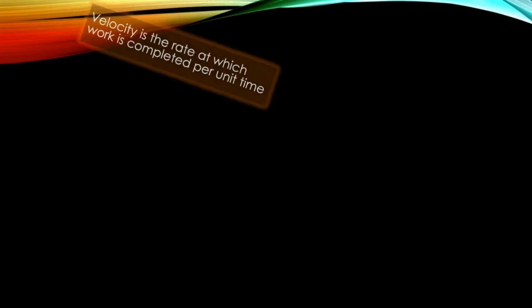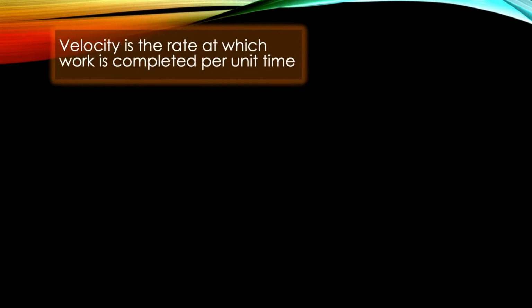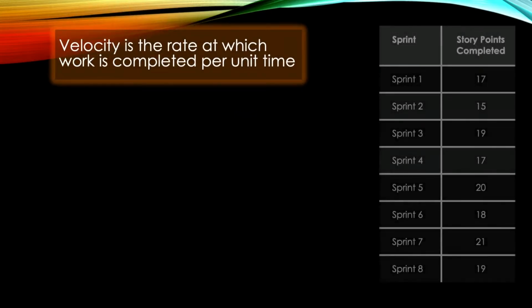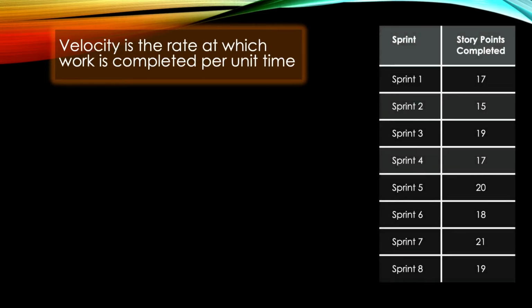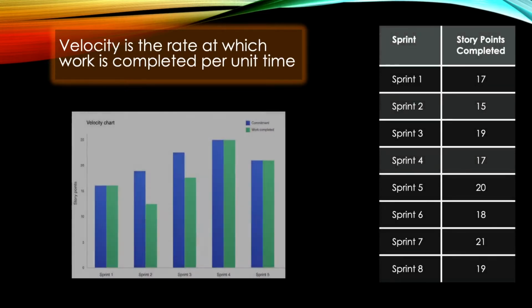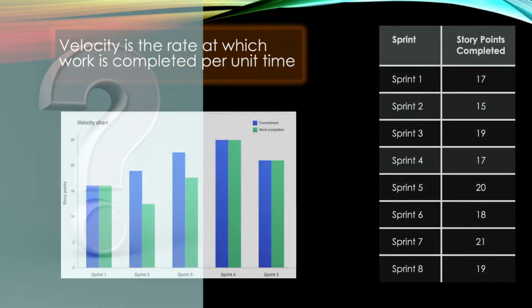One of the most popular approaches for Scrum teams to determine how much work they can complete in a sprint is to use velocity metrics, typically capturing the number of story points completed each sprint and using this history to estimate their predicted velocity going forward.